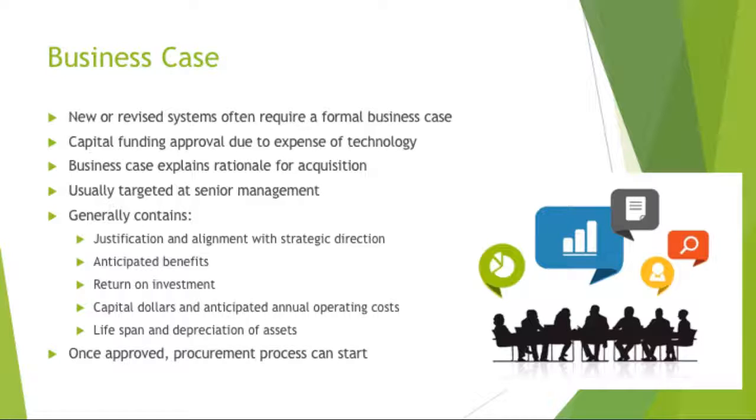Generally, when you are bringing in a new system or revising an existing one, you will need to complete a formal business case. The organization will be required to commit resources to the project, and it's important for the executive to understand exactly what the financial impacts are, how much the one-time costs are, how much the ongoing costs are, any savings that will be realized, and what their ROI, or return on investment, is. ROI is one of a number of financial measures, along with IRR, or internal rate of return, NPV, or net present value, and payback period, which may be used when evaluating the financial portion of the business case.